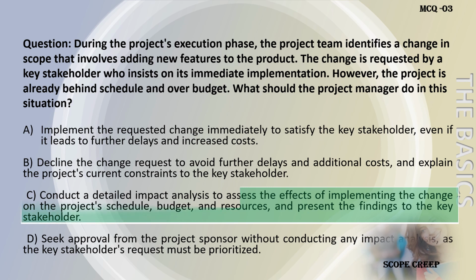Answer for question number 3 is C. Conduct a detailed impact analysis to assess the effects of implementing the change on the project's schedule, budget, and resources, and present the findings to the key stakeholder.